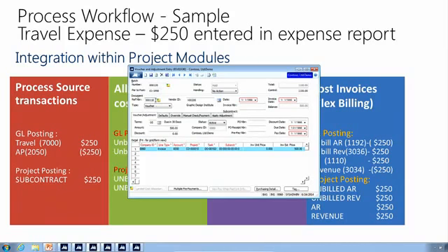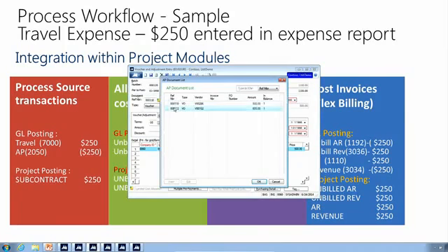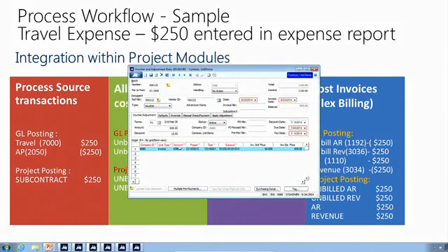In the same batch, I've created the subcontract costs. So this is an example that would go to account 4090, also flowing to the same project for 60 units, but the price is $600. So we're paying that vendor $10 an hour. So that's the source of both the materials and the subcontract.